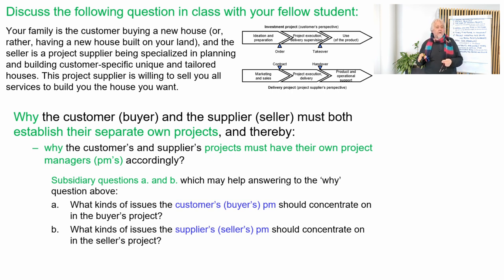And the customer really can make very difficult trade-off decisions regarding different objectives. So, for example, sustainability can be so important to the customer that the customer is willing to pay a certain amount of money more. Or if we take, for example, an IT system, the customer's representative can decide that, okay, we can do certain recording work in an IT system manually, and we don't need a fully automated system because we don't want to pay too much.